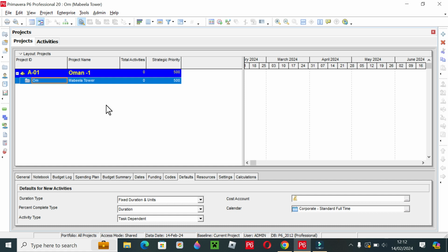Now after that, moving forward to making activities, making relationships, assigning the resources and other things, making the Gantt chart, S curves, histograms, the first thing is to make a calendar, because the calendar is the main element that will plan your project, because everything in your schedule is based on dates, and if you don't select a proper calendar, then your planning will definitely be disturbed.